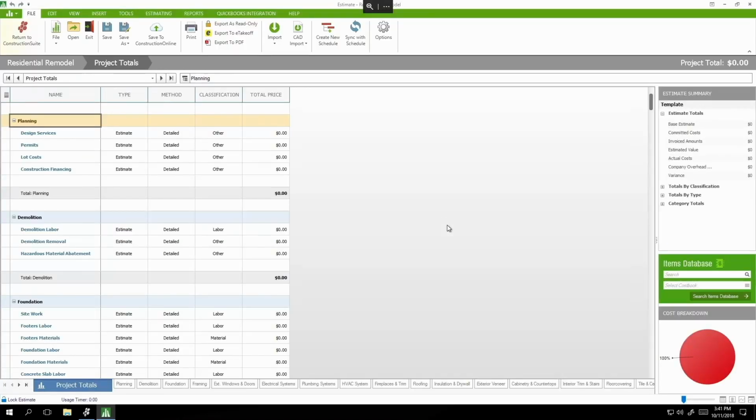And we can put all of the information together for our estimate templates here. This is also exceptionally beneficial if we're doing semi-custom homes where we build the same, let's say, 7 floor plans, because we could estimate out that floor plan here, have that already available in a project template labeled according to those plans, and then whenever we're starting a new job, we sell a lot, we add the plan in, create a new project using that plan's project template, and then we have the schedule already set up, we've got the estimate already set up, we've got contracts ready to populate, and so on.